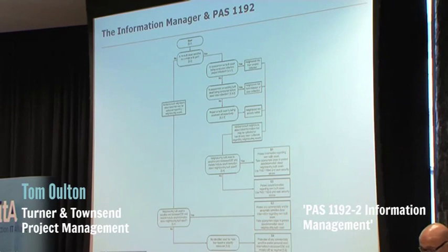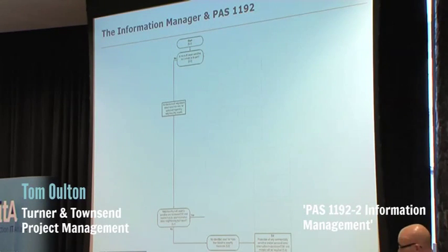Most projects will be designated S4 down at the bottom, which is situation normal, continue as you do at the moment with your usual kind of data security and information flow. S1 to S3 are for varying degrees of project sensitivity that should be applied when working in one of the 9 areas of national infrastructure, as they're called, which is communications, emergency services, energy, financial services, food, government, health, transport, water. If your job is one of those, or is next to a building that does one of those things, then your security goes up a little bit, and you have to be a bit more careful.